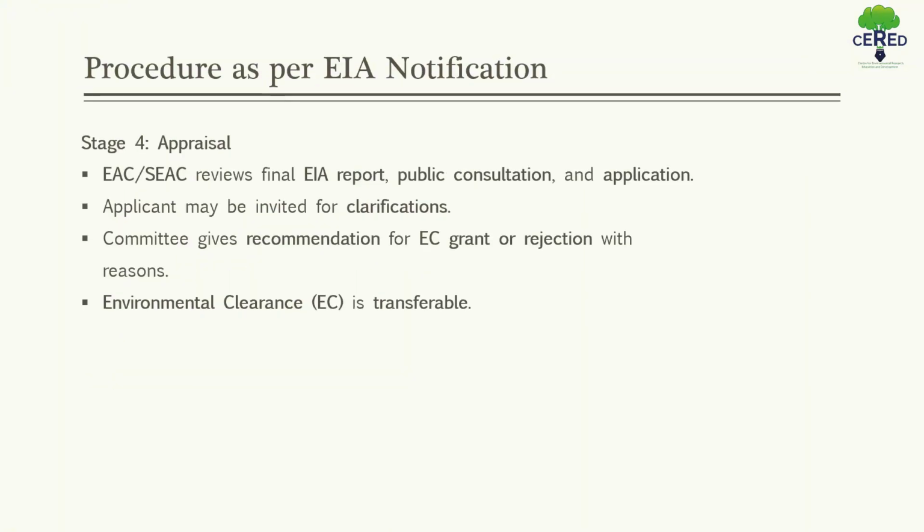Now, the next part is appraisal in front of the EAC or SEAC. The project would be scrutinized by the EAC or SEAC based on the final EIA report after public consultation, the outcome of the public consultation including public hearing proceedings, and the application of the project proponent.